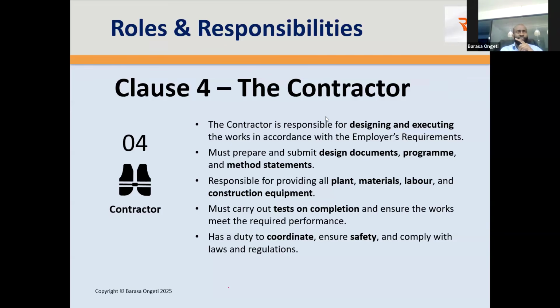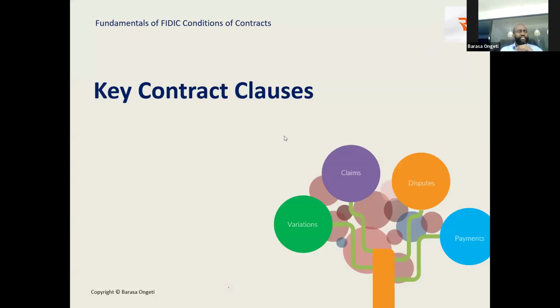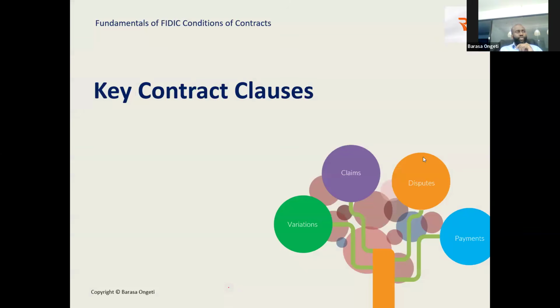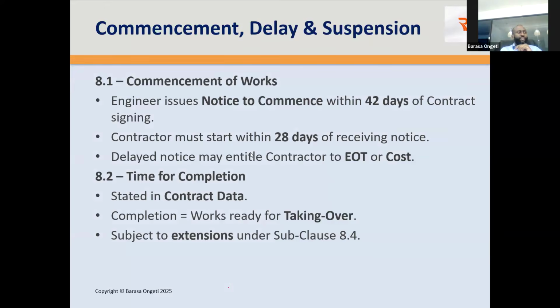Be keen on that whenever you're handling the red and yellow, because that's something we also note tends to happen. Okay, so as I've said, we don't have time to cover everything. We'll just cover clause 8.1. And 8.1 says the engineer issues notice to commence within 42 days of contract signing.